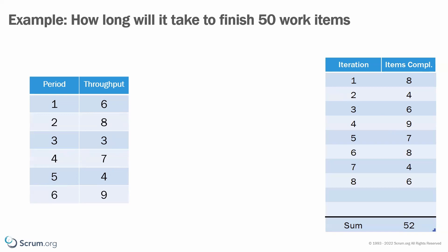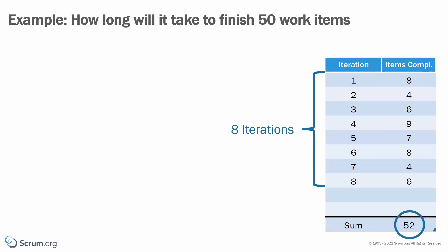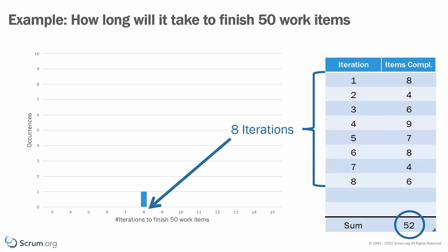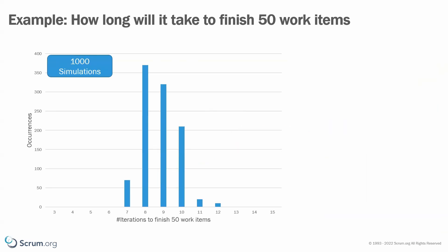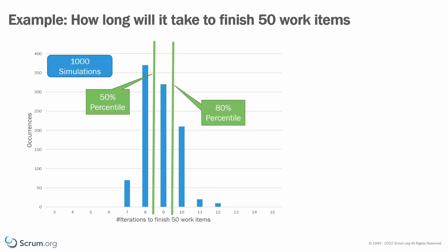Again, we use our historic data and randomly pick a throughput from one of those periods that we put into our result table — exactly what we did previously. The only difference is that we now look at the sum and stop once we have exceeded the target number of items. In our example, we are looking at the time it takes to complete 50 items. This first simulation suggests there might be a chance to finish those 50 items in eight iterations. After 1,000 simulations, we can see there is a 50% chance to finish these 50 items in eight iterations or less.